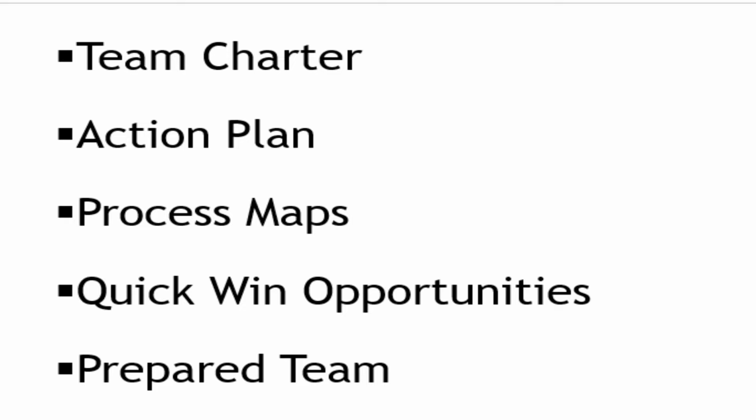All right, we now come to the end of the team charter. And the next deliverable in the define phase is the action plan. Now, in the action plan, similar to the project plan which was in the project charter, here you have something additional, which is also the names of the people. So in the action plan, you will have who will do what, when.